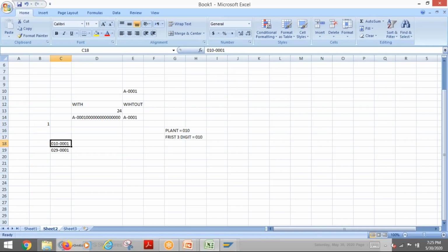What you said is correct, but after the plant we have the 0001, right? While creating, if I made any mistake, the system will allow, right? Yeah, here also I can put PROJ PSPID. That is the project definition. If it is a project definition, then my length is equal to how many, 3, 4, 8, like that. I can restrict.